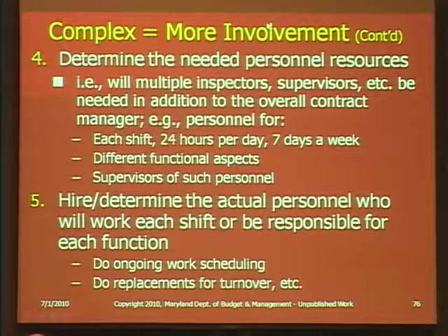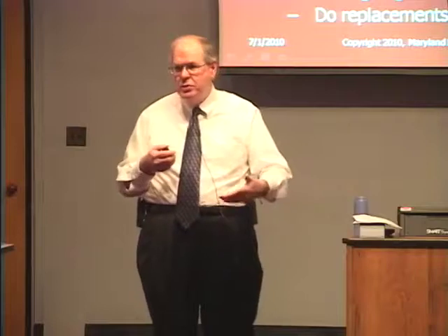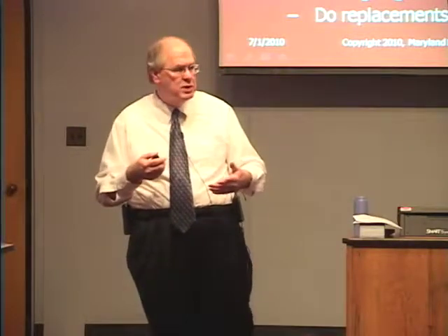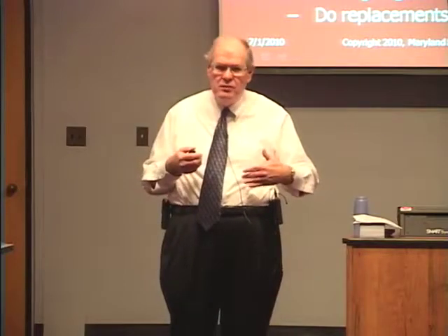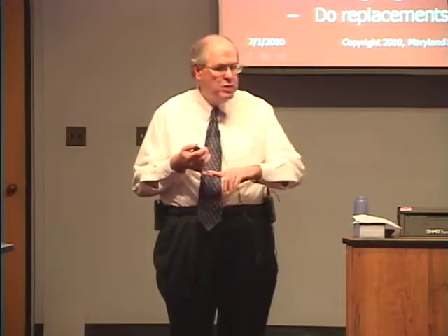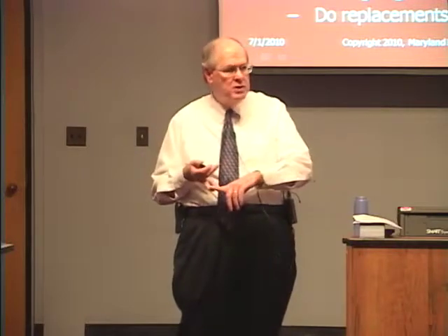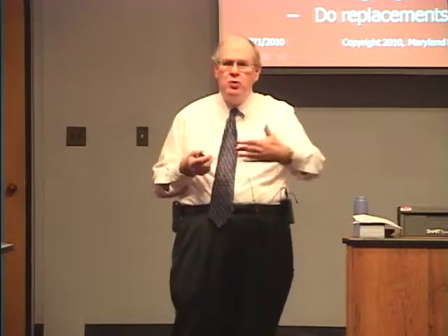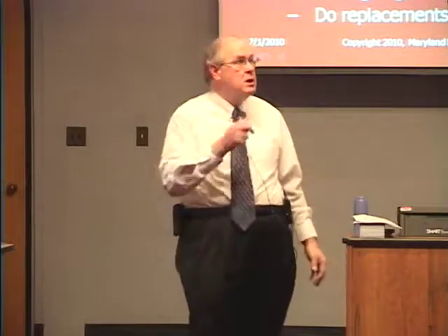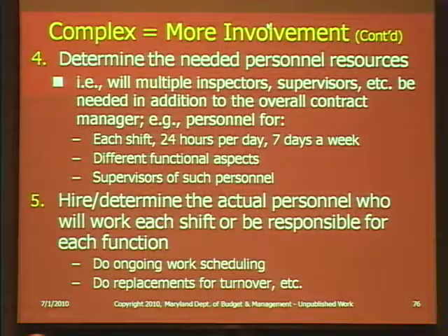Sometimes for very major projects, you may have to go out and hire people. You may have to hire state employees so that they'll be in place for the next 5 years to be able to monitor something that is a very complex undertaking. And if that's what you have to do, you have to know this in advance so that you can go and hire the people and get them trained and get them in place before you do a procurement to have a vendor start working. So you have to know what pieces go first. And you have to schedule things of this nature.